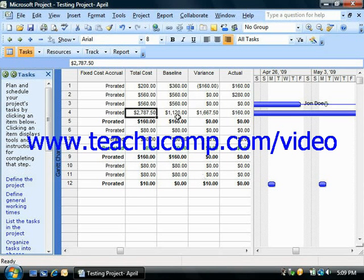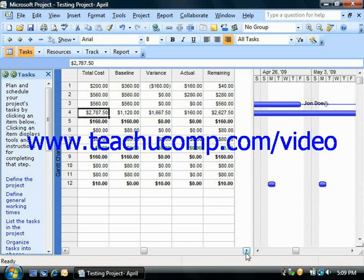You can also see the actual costs, which are the costs that have been incurred for tasks, assignments, and resources. You can also see remaining costs, which is the difference between the current cost and the actual cost for the assignment, task, or resource.